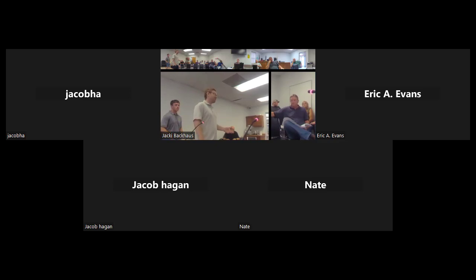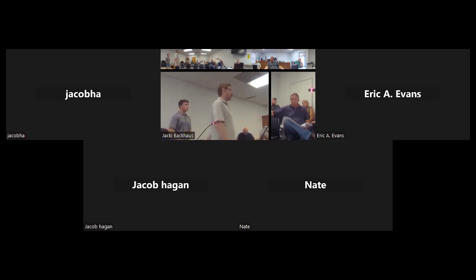And that would give time, if landowners want to get together and talk about right of way incentives, we can do that. The district will have to acquire right of way either way, but you would be waiving buying it. Maybe you waive severance instead of right of way. The way we've estimated it, I think severance was probably 2/3 of that cost versus buying right of way. So waiving severance would take a significant chunk out of that. So like probably $500,000 or so.